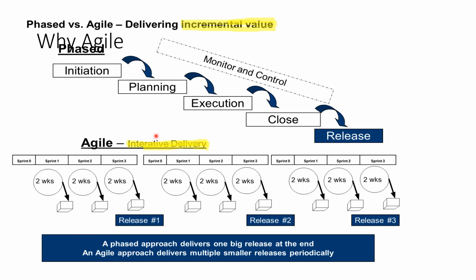Every month you are delivering something to the customer, but the customer is not experiencing the value, right? You are delivering something the customer does not want, but you are following iterative delivery, right? You are delivering features the customer does not want. The customer is not experiencing that value. Is it agile? No. Let's take another scenario. You are delivering value, what the customer wanted, working software. But instead of delivering every 2 weeks or every 4 weeks, the first delivery goes in 2 months and the second delivery goes in another 6 months. You are not doing periodic delivery. Is it called agile? No, it's not agile.